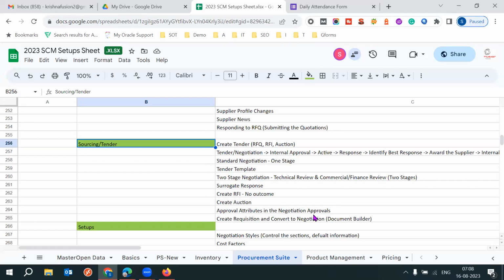So you send that RFQ to the different suppliers. In case of laptops, you can send that RFQ to Samsung, HP, Lenovo, Dell. Those suppliers are going to send you the quotation. When they send you the quotation, you will identify the best quotation based on the price, payment terms, warranty details and branding of that supplier. Accordingly, you'll choose the best supplier. On top of the best supplier, you will place a purchase order. So that entire process we handle in the sourcing module.